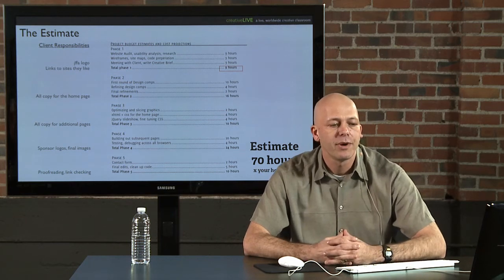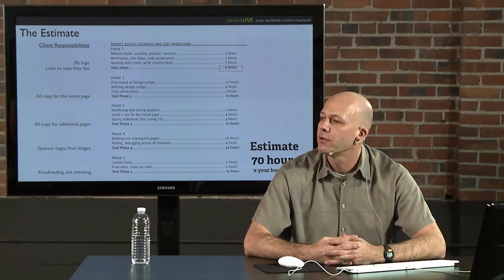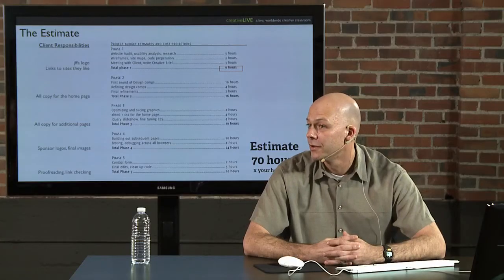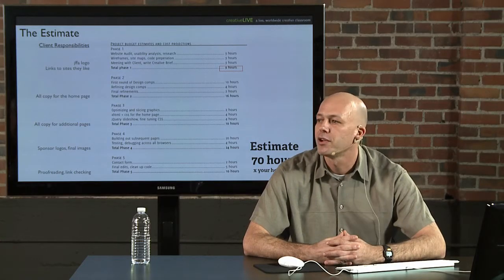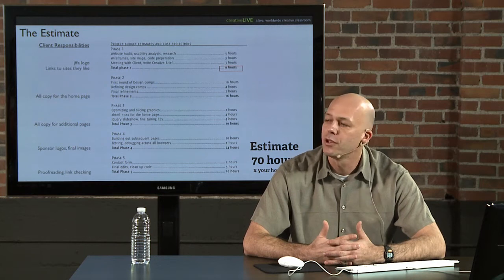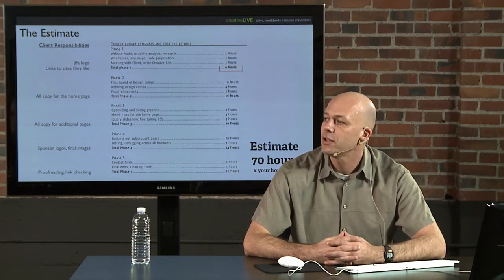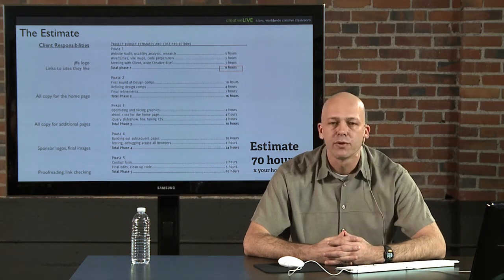So when I say my estimate is 70 hours times your hourly rate, Andrew, you know what your hourly rate is? Yes. And sometimes it's lower and sometimes it's higher? Correct. Jim, you've got the same issue? Same thing, yeah, depending on the client and the project. Yes. Kevin, you've got a flexible hourly rate, what the market will bear? Everyone's got to figure this out based on their hourly rate. So if my hourly rate was $100 an hour, this website would cost $7,000. Everyone can figure that out.